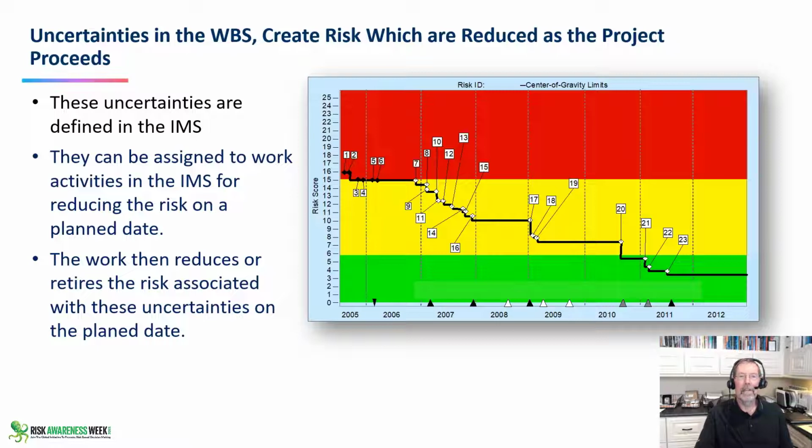you need a chart like this that shows how you're going to burn down the risks, where these are in the schedule, what the units of measure are for showing that you went from this level down to this level, and then we stayed here for a year, and then we went down to this level till we get to green, and then how to keep it green. Keep the program green is one of the phrases we use all the time.